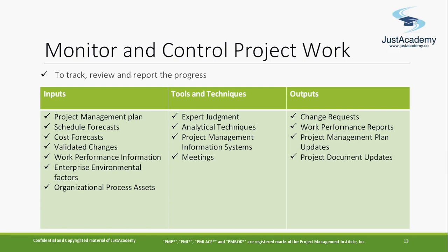And whenever you get a change request, it has to go through perform integrated change control. Whenever it is a new requirement, that has to go through perform integrated change control. Whenever there are bug fixes, there's no need to go through change control. You have to fix them, because that's within the scope. That has to be fixed. But new changes need to go for integrated change control, which we're going to discuss in the coming slide.